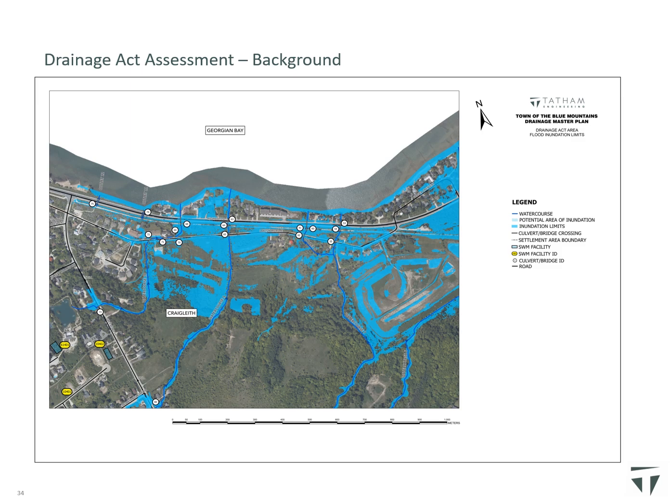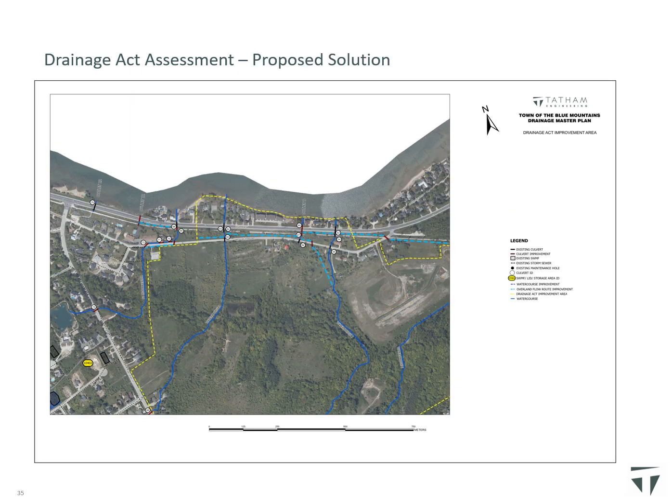There is an opportunity for drainage deficiencies in this area to be addressed as part of the proposed development in this area. As such, a petition for drainage works has been filed with the town in accordance with the Drainage Act. Conceptual designs of the drainage solutions proposed to be completed through the Drainage Act assessment have been prepared by Crozier Consulting Engineers and peer-reviewed by WT Infrastructure. WT Infrastructure has also reviewed the proposed drainage improvements and the process for the Drainage Act project to ensure the proper process is followed in accordance with a petition for the drainage works under the Drainage Act.